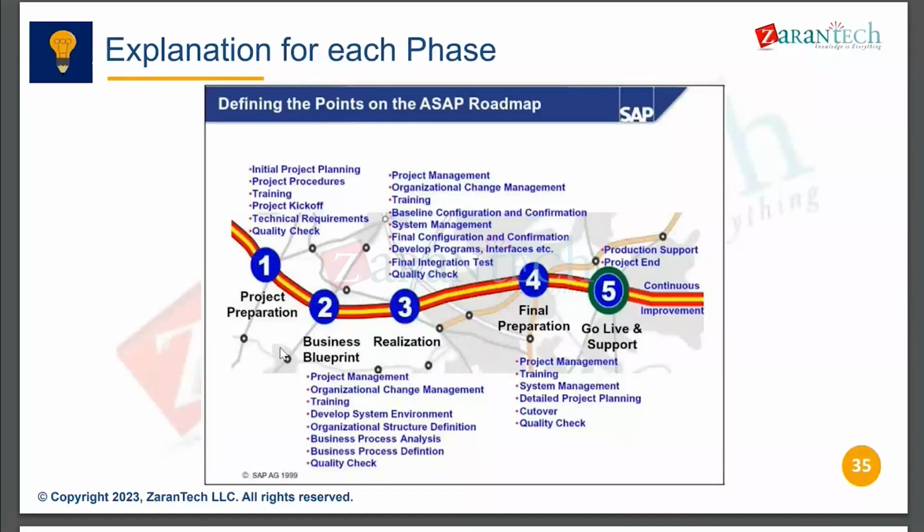Then the realization phase: baseline configuration to the system, and we'll manage the development system completely. We'll develop programs, interfaces, or any enhancements required, which are completely custom solutions. And final integration test, where entire modules will be tested end-to-end. And the final quality checks.